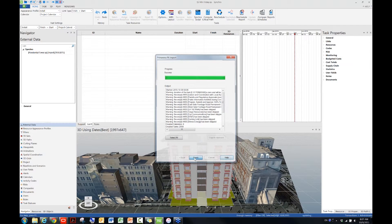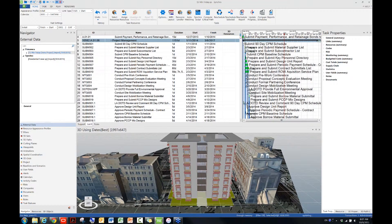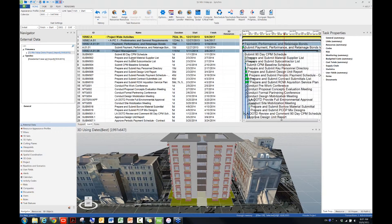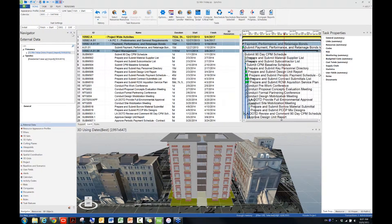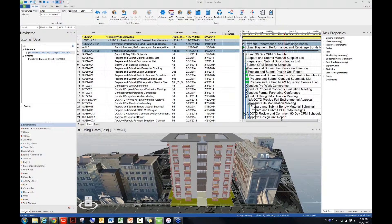And then you will see this schedule, which has more than 2,000 activities, has been imported into Synchro via a P6 XML file already. Okay, so this is pretty much for the P6 XML file import, which is the new feature of this latest version of Synchro, which is 5.1.